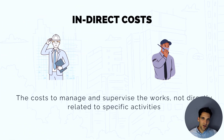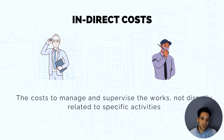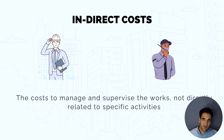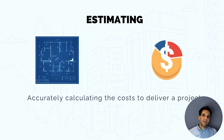On the other side, we have indirect costs — costs not directly specific to a single activity. These can be things like the cost to supervise and manage the works. A project manager overseeing many different tasks across different scopes is an indirect cost, not directly attributable to any specific activity. Now that we understand project costs, we need to understand what estimating is.